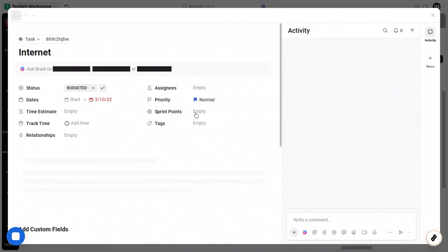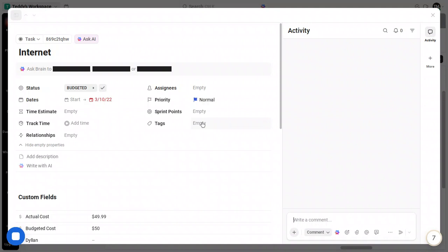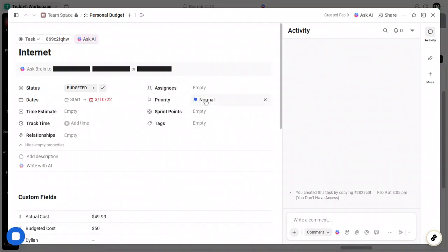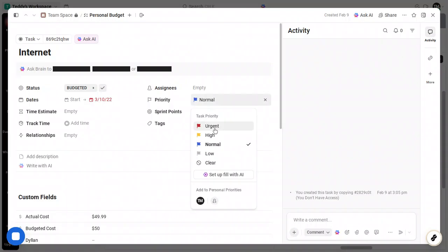While you're in the task details, add time information. Choose Add Time and enter the time details that make sense for your work. Incorporating this information helps your timeline reflect the effort or duration expected, and it makes the plan more direct for the person responsible. Even though we're focusing on color, accuracy in time fields ensures the colored bars appear in the right places, with lengths that mirror the real scope.